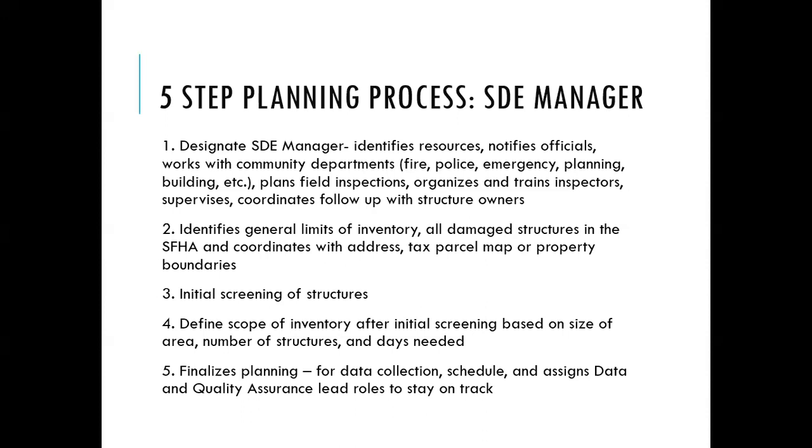So you would first identify the limits of that inventory. So where all the damage has occurred compared to the floodplain, how many structures is that? Where are they located? How far and wide are these assessments going to need to be done? All the damaged structures in the special flood hazard area. And then you coordinate with address and tax parcel map or property boundaries.